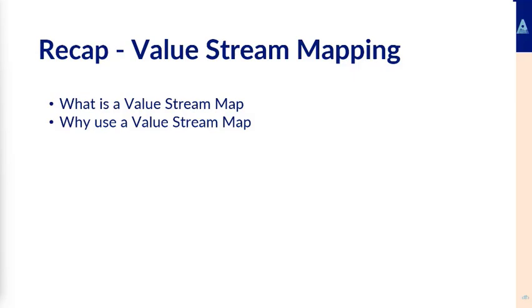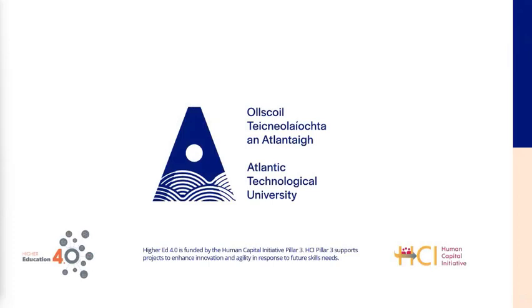And if you said, well, actually we have 35 concrete slabs in this job, the first 3 or 4, how efficient, how have we mapped it out, or how has it actually worked, and how can we improve on that for the next 30? That's what we're looking at here from a value stream map. And then why use it? It makes problems visible or potential wastes visible. Okay, thank you very much.